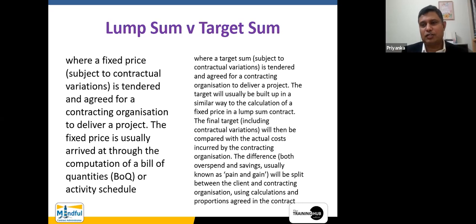So this is somewhat similar to the mechanism which has been adopted by FIDIC for the value engineering proposals, especially the gain purpose, not the pain. The value engineering clause, which appears from the FIDIC 1999 version onwards, specifically speaks about this particular saving. So this is also important.